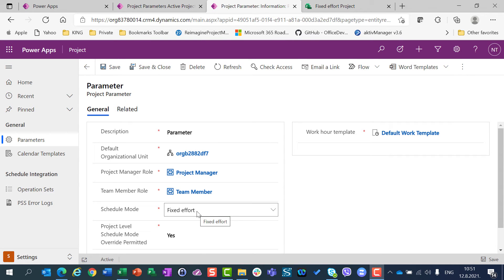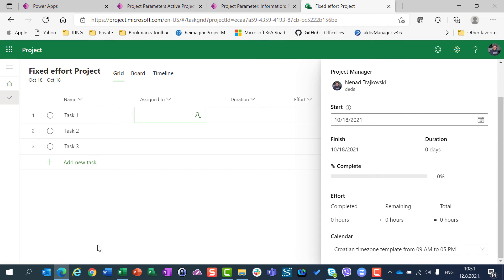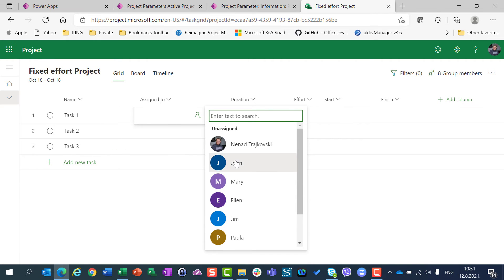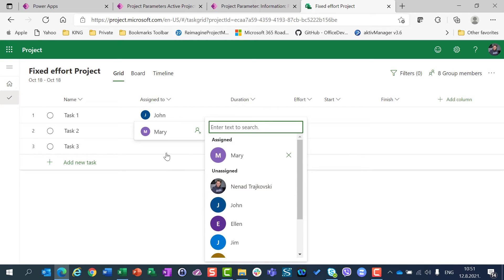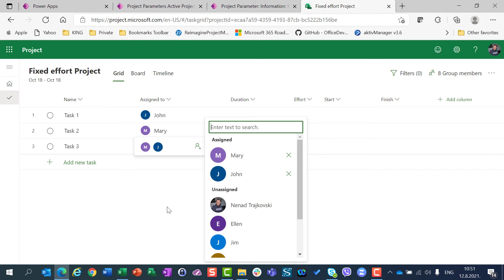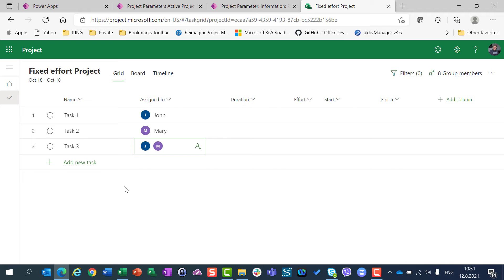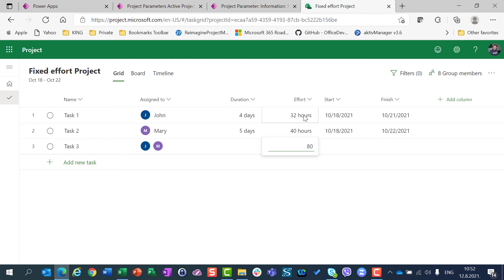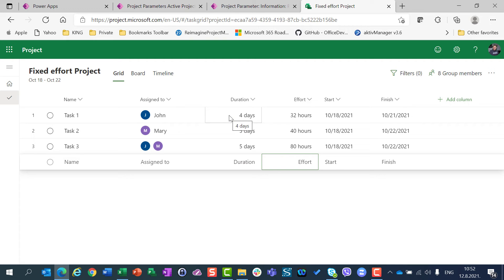The default schedule mode shown will be the one defined in the project parameters. For this demonstration I created three tasks. I will assign John to Task 1, Mary to Task 2, and both John and Mary to Task 3. Since this is a project with Fixed Effort scheduling mode, I will define the effort. John needs 32 hours to finish Task 1, Mary needs 40 hours for Task 2, and John and Mary together need 80 hours for Task 3. Duration will be calculated automatically.